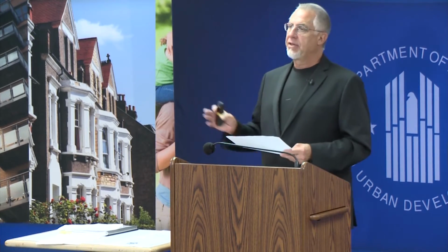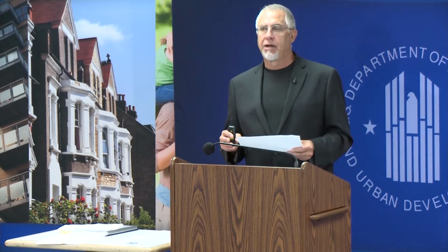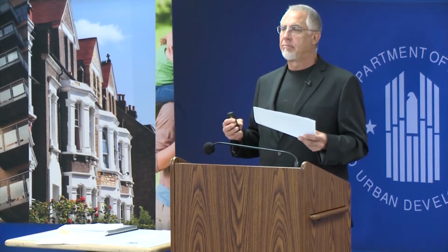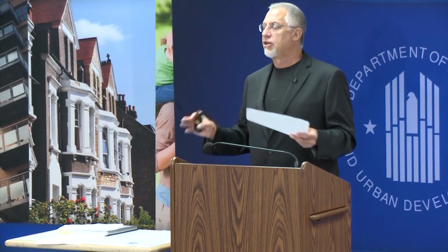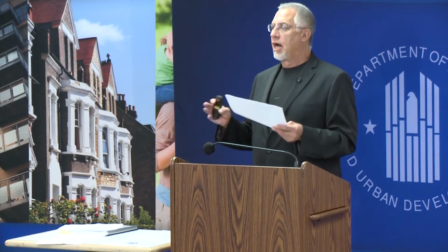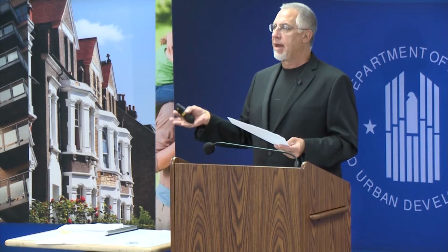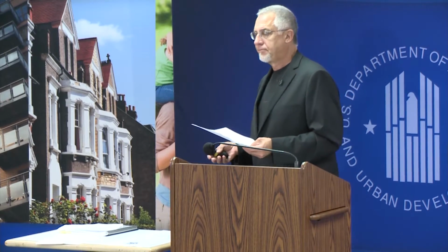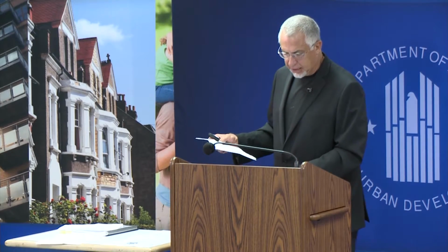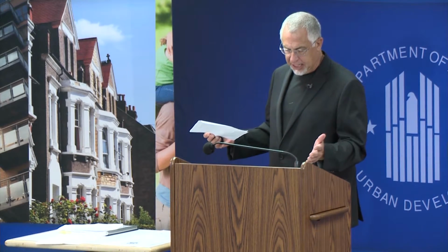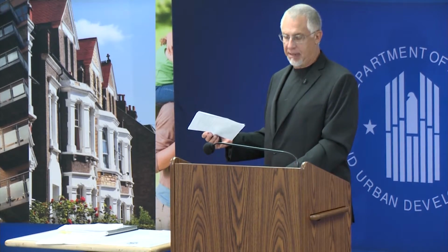So that's fine for them to have Wilson Consultants prepare the procurement documents, but they must be excluded. They could not be considered in actually receiving the award under that procurement process. Very good. And that is laid out explicitly in 200.319(a).